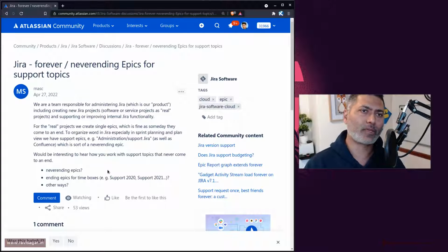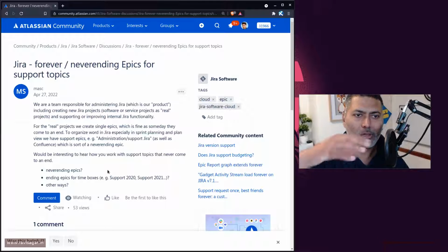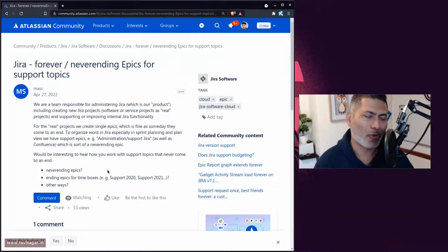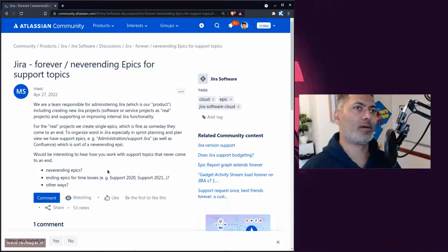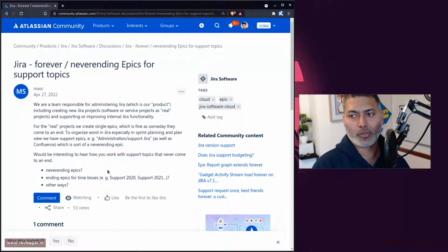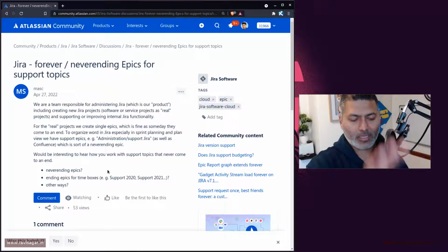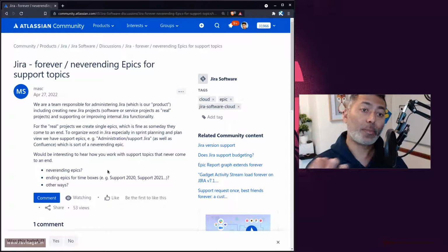Again, you don't have to, but if you create an epic, it will help you in reporting because you will have all the items. Because when stakeholders look at the plan, let us say they're looking at all the epics, and they know that okay, this particular epic is for this quarter. Like let us say you want to add a new feature, you want to add a payment gateway to your mobile app, or you want to add a new feature to accept maybe payments using a specific type of card. So basically these are your epics, and when you're looking at these epics as a stakeholder, you want to know, okay, these are the epics, this is the overall progress, and for grouping those items that you want to deliver in a specific quarter.